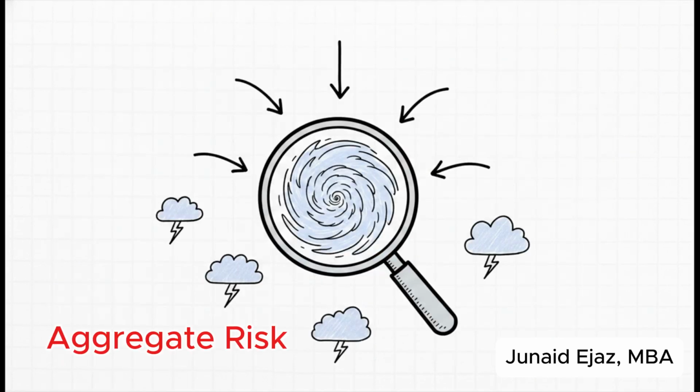And instead of just looking at risks project by project, the PRINCE2 design theme demands that we aggregate them. Take this utilities provider example. Initially, individual project managers were working in complete silos, totally missing the big picture. So rather than having 10 different project managers stressing out about local rain delays, the program aggregated the data into a centralized map. This let them see the overarching systemic threat of regional weather patterns and floods. Because they synthesized this data, they could safely optimize labor and equipment routing across the entire board. They literally turned a logistical nightmare into a massive efficiency win.